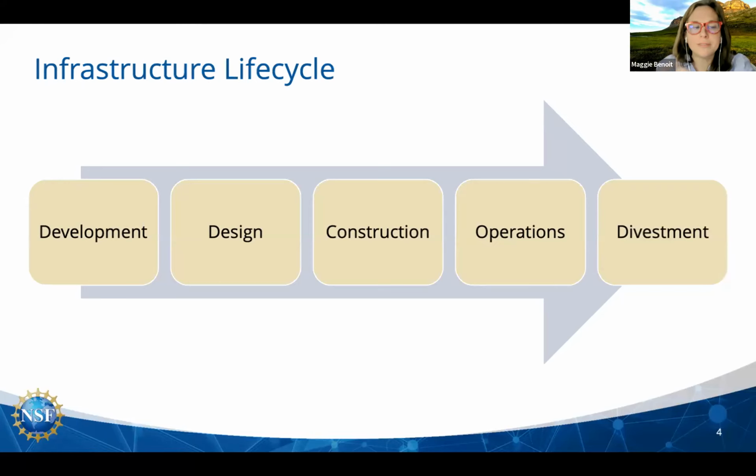Also, the whole life cycle of the infrastructure, so this includes what the operations and divestment plans are, needs to be determined in that design phase. This wasn't always the case at NSF. For past MREFC projects, we may have kicked the can down the street and determined the divestment phase much later, but we don't do that anymore. The divestment phase has to be determined during that design plan timeline.